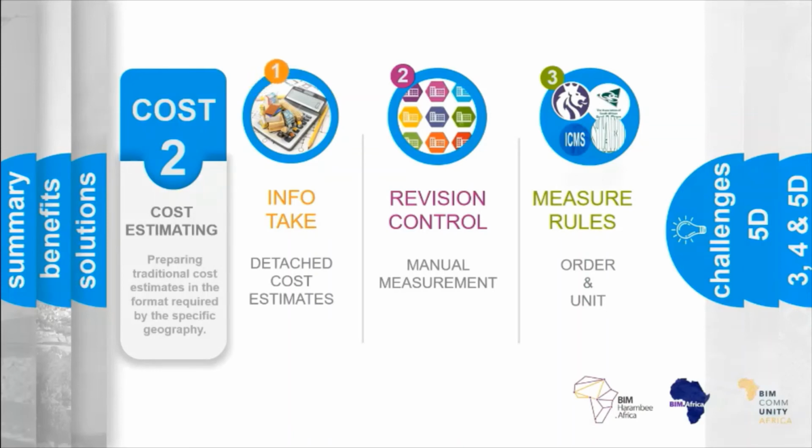So this further perpetuates the misconception amongst quantity surveyors that BIM and 3D models is a design tool, and that there is not necessarily a place for quantity surveyors in BIM. It further becomes a problem because that model and that design information is detached from the work in progress and the workflow of the design team before being issued to the quantity surveyor or the cost estimator. So we have issues with regard to revision control because we're not working on a live version. And any manipulation of the model after receipt from the design team needs to be repeated for every revision. So there's a lot of rework in that process.